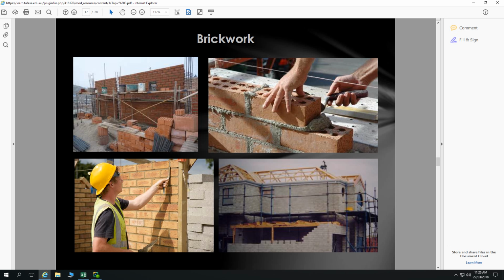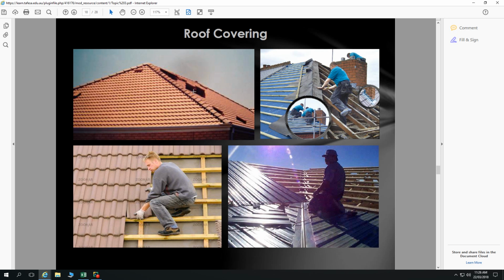If it's roof sheeting, that can happen. Depends on the space. You need a lot of space to set out your roof sheets on the ground before they're shot up, but that can happen. So we've got our brickwork happening. Now, brickwork does take time. So we'll allow probably about 2.5 weeks for our brickwork. In that time, we can have some other things going on as well.